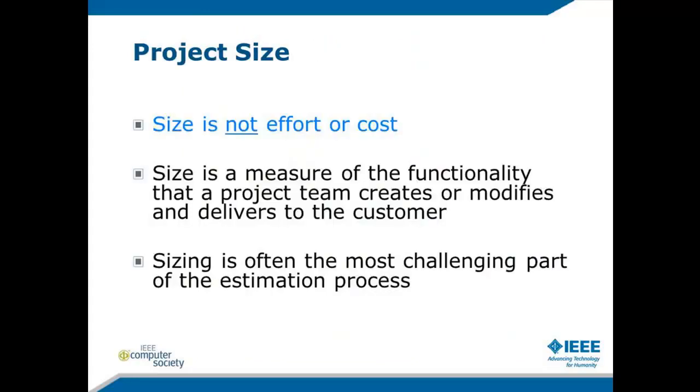To hone in on it a little bit more, let's talk a little bit about size, because that's probably one of the most important things to doing a really good job of estimating. We want to get a handle on functionality. A lot of times when we start working with people and ask them how big, they'll say it's a certain dollar amount big, or it's $10 million big, or it's 6 months big. And that's okay, but what we really like to get to is functional size. How much work can the team deliver? How much functionality can that team deliver?